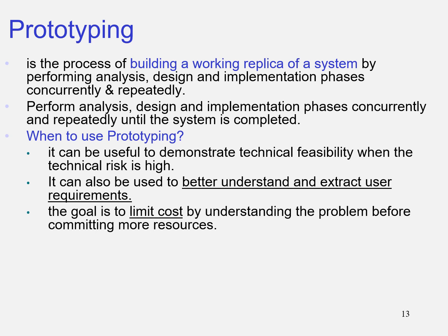Why do you do prototyping? When you do prototyping, it is used to demonstrate technical feasibility when the technical risk is high. What that means is, sometimes when you meet the user, the system is very technical, and you worry that you don't capture what the users want.